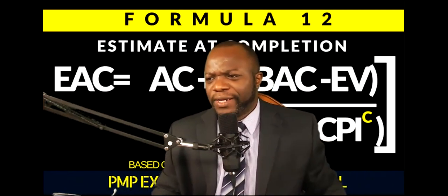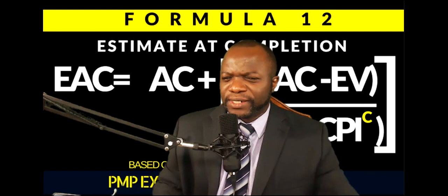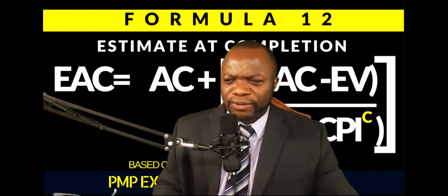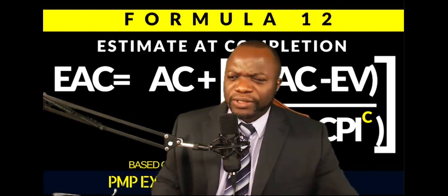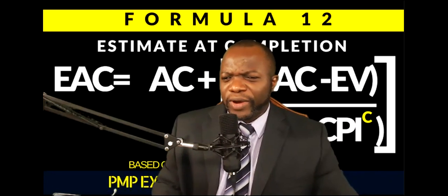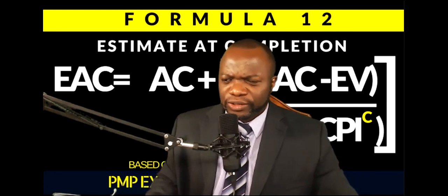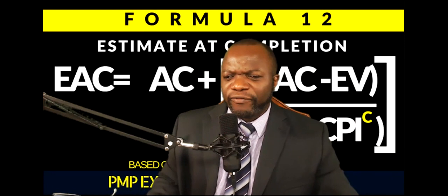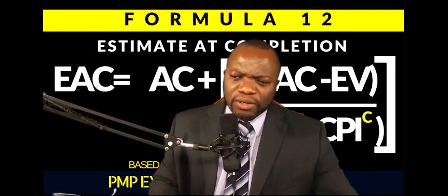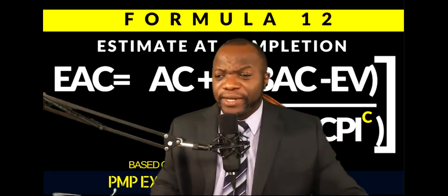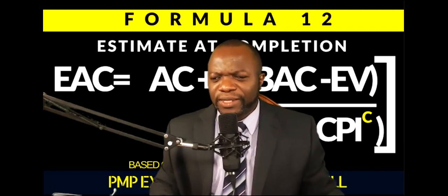This is how you calculate earned value using milestone weights. The milestone weighting process assigns budget values to each milestone. So think about it. Not until full completion of each milestone is the budget earned. Milestone weighting is used as a method for work packages with long-term durations, and ideally should have milestones each month or accounting period. So when you think about this, as told to us by our friends at the Department of Energy, you have a scenario that could look something like this.